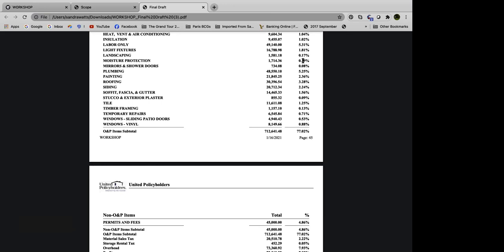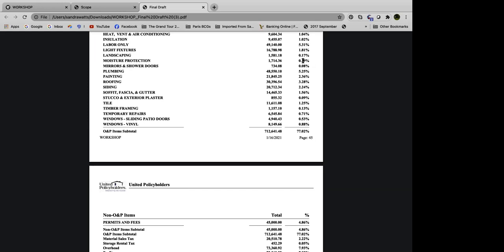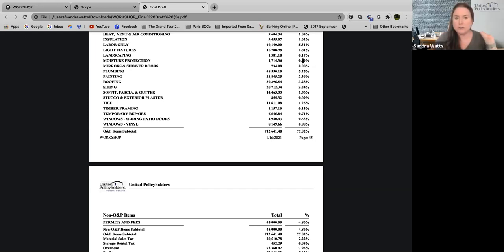Property is remotely located, so obviously it's going to be additional charges for delivery of materials and travel for contractors and subs. And should that be included in the scope of work? Yep. All right. Let me add something to that to you guys. There's a bunch of COVID requirements now through Cal OSHA, temperature checks of people. So there's a thermometer that you need, a hand washing station that needs to go out in front of the property, and PPE for people. So also COVID required and OSHA required safety gear can be added. Okay, go ahead.